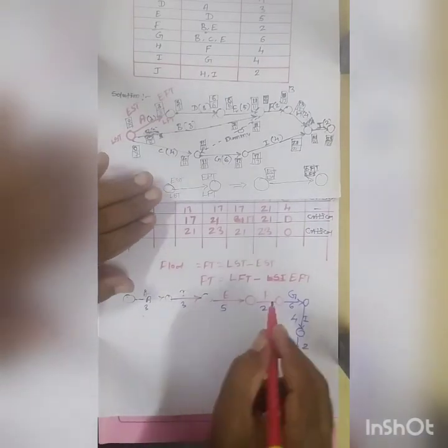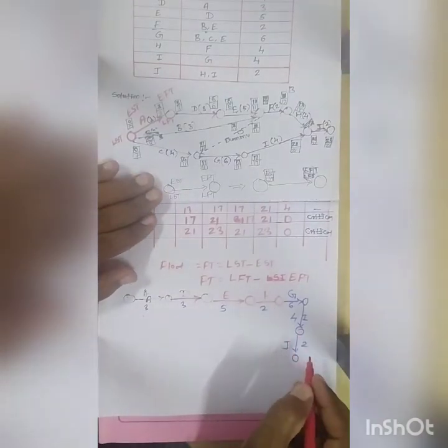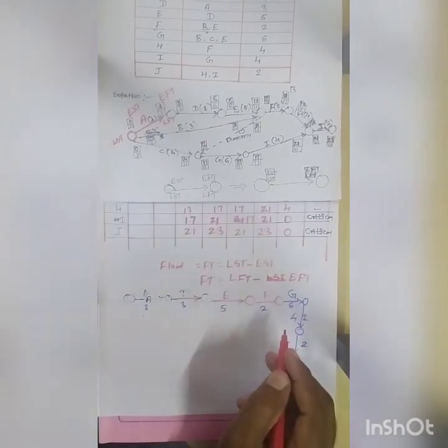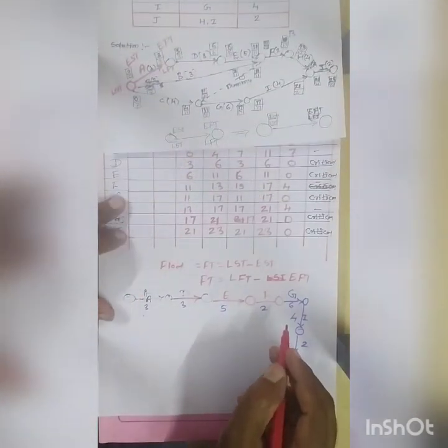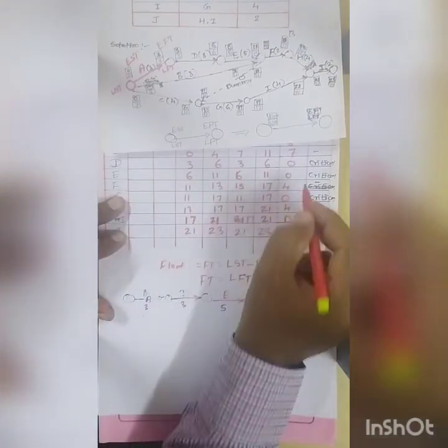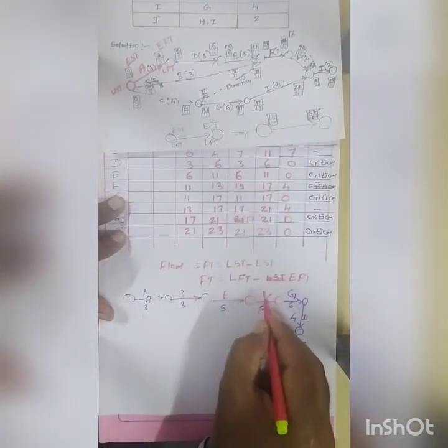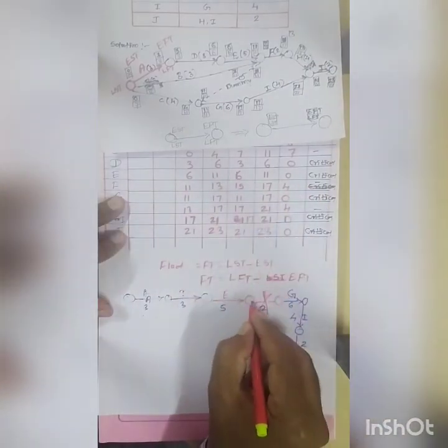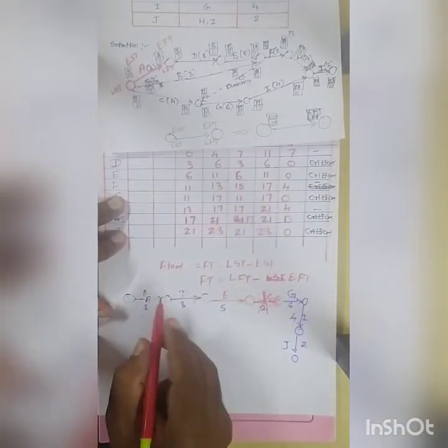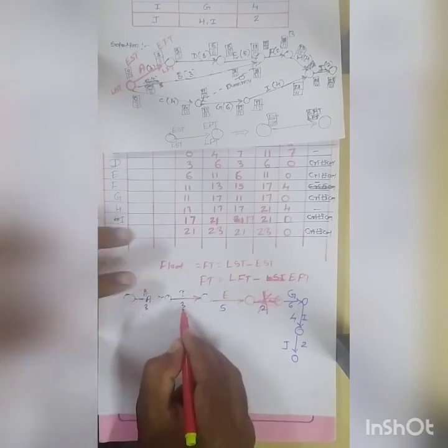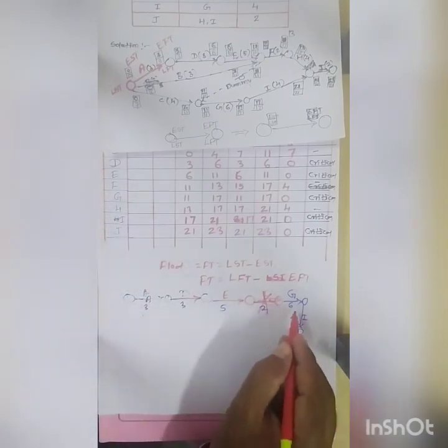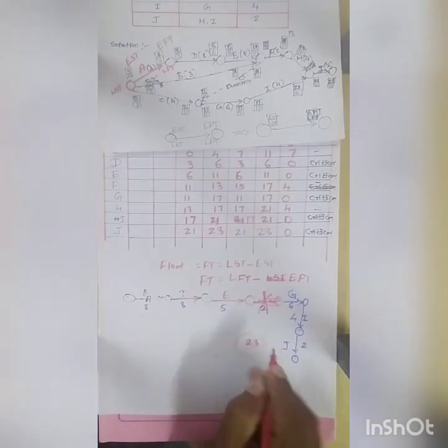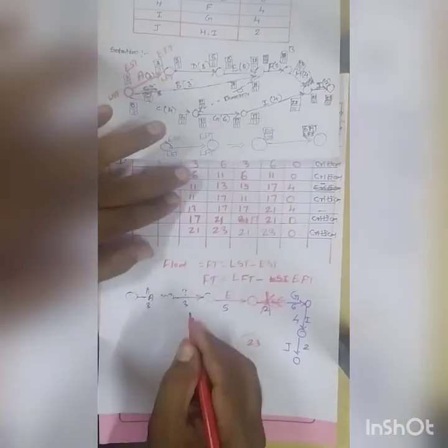So here it is actually 27 days, which is more. We have made a mistake. Here the F activity is 4, so it has to be removed because it is not critical. F activity is not critical, so remove this. So here it is 3, 3, 6, 11, 17, 21, 23. This is 23 days. It is critical, so this is the critical path.